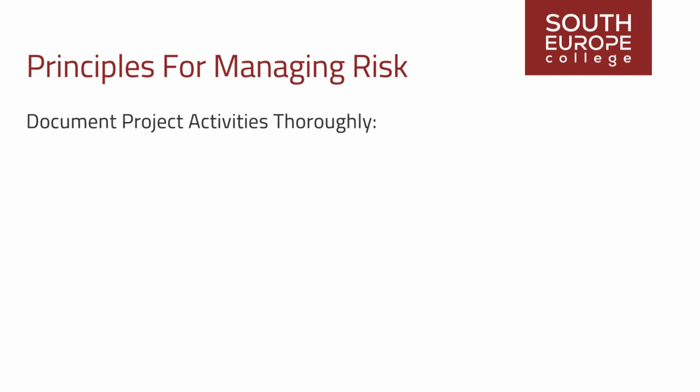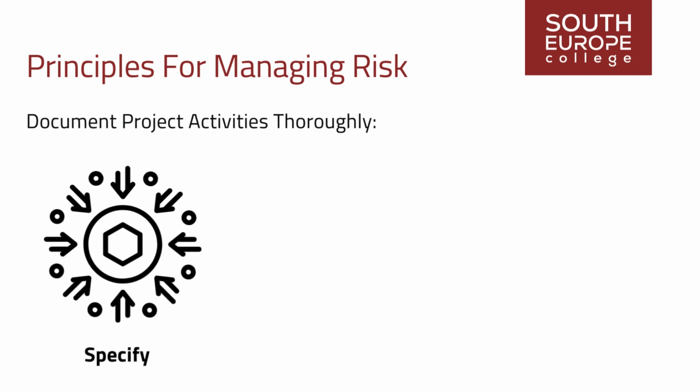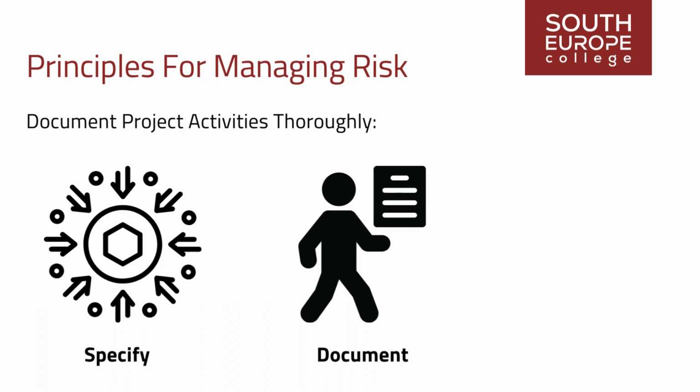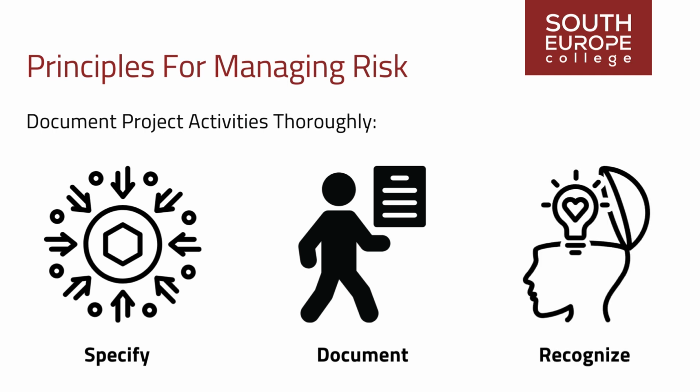Document project activities thoroughly. Specify procedures to guarantee accurate and comprehensive documentation of the project. Include documentation for proposals, detailed project plans, change requests, summary reports, and a post-completion summary. Recognize that thorough documentation of past projects provides valuable insights for planning future endeavors, estimating required time and resources, and identifying potential risks.